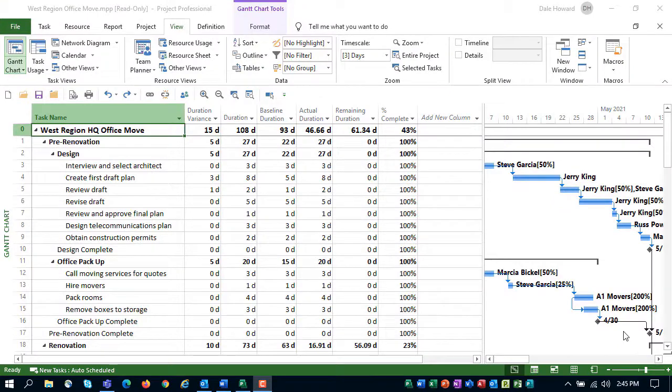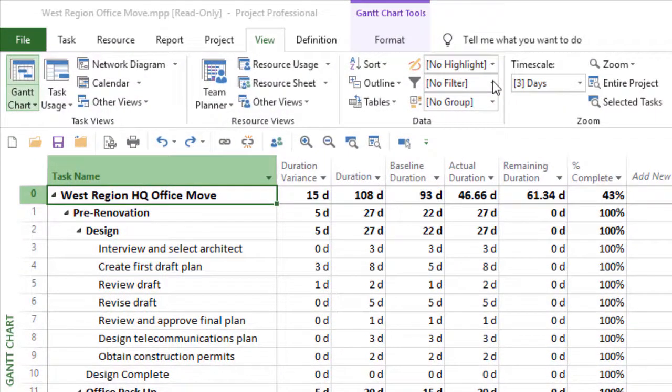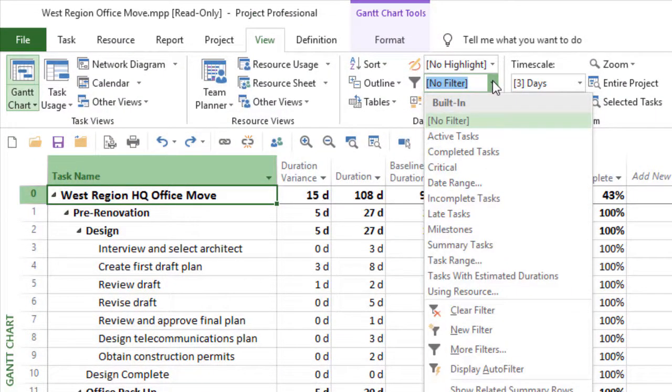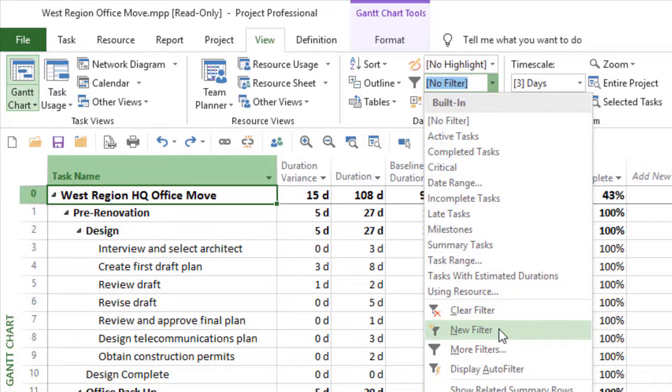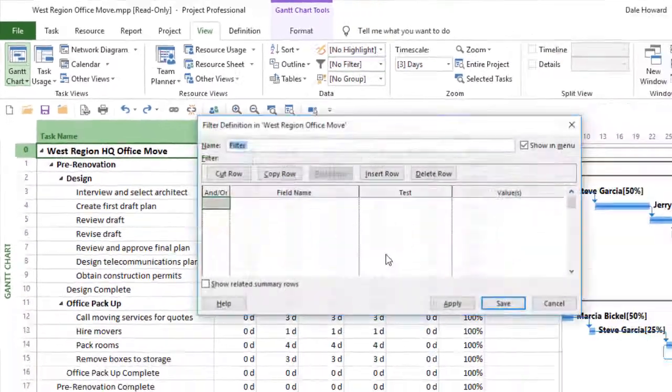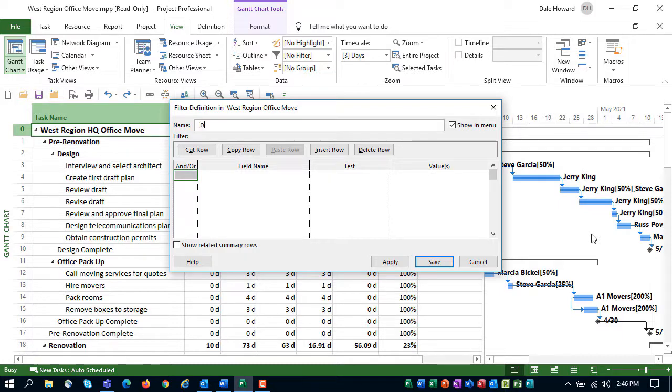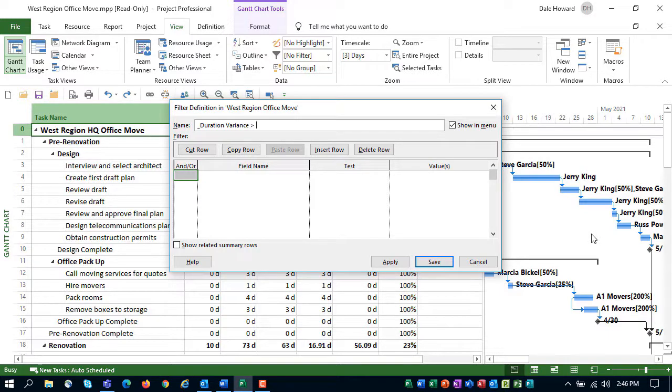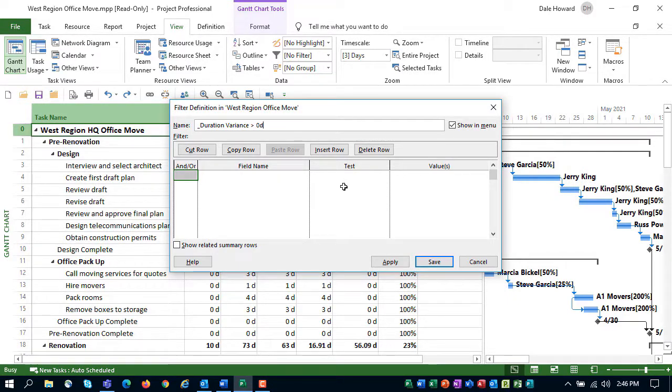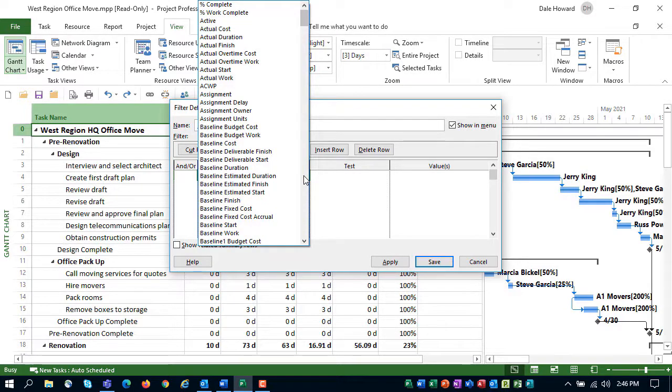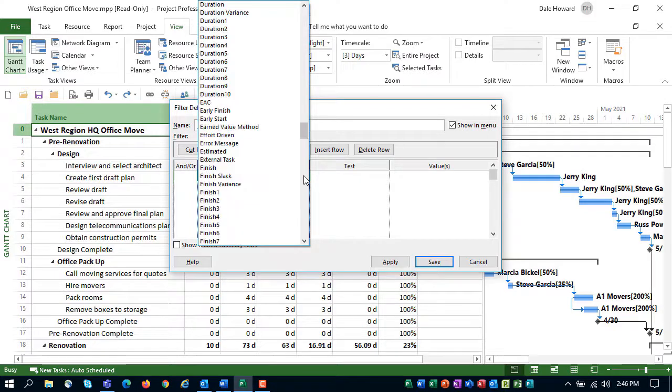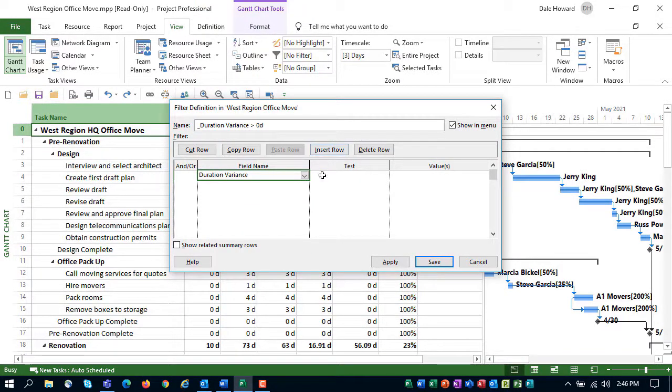After creating the new custom table, you're ready to create the custom filter. To create the filter, click the Filter Pick List button and select the New Filter item on the menu to take you directly to the Filter Definition dialog. In the Name field, enter a name for this custom filter, such as Underscore Duration Variance is greater than 0 days. Leave the Show in Menu items selected, and then create the filter criteria as follows. In the Field Name column, click the Pick List and select the Duration Variance field.